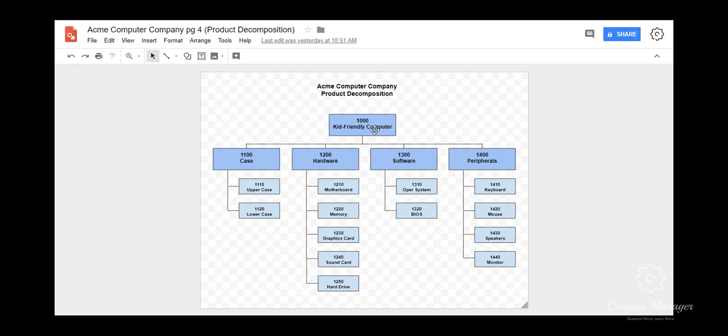So between the 1000 and the level below, you would have each of the requirements. This allows you to identify each of the requirements that your product must have. Conversely, if your stakeholders came up with a requirements document saying the product you're designing must have these 4 requirements, you would list the requirements directly below your product so that you ensure you identify each requirement in your design.